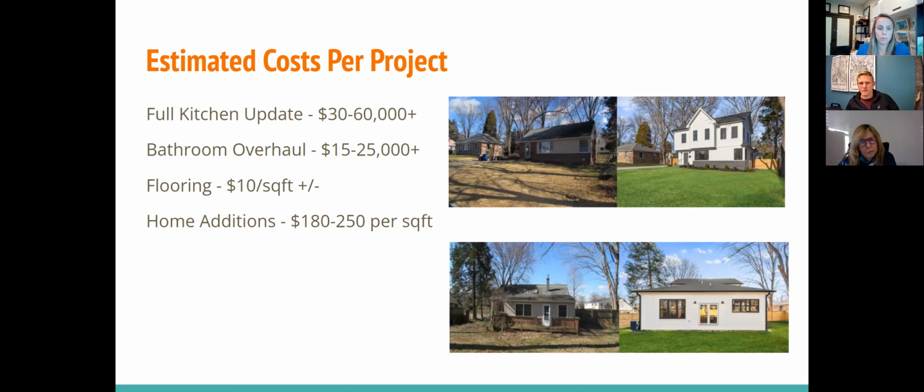They usually start around $15,000 and can go to $25,000 or so per bathroom. Again, if you're doing a full house renovation or a major home addition, you're doing like four bathrooms and a big kitchen. Once you add all of these prices together, the whole project, there's some economies of scale, so some of these per-bathroom prices could get better and come down a little bit.